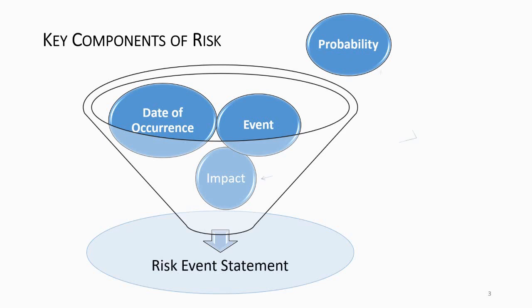Look at the probability and impact together and that gives you the priority. What should we be doing about this risk? Is it something that we need to look at today, or is it something that we can set aside and just monitor?